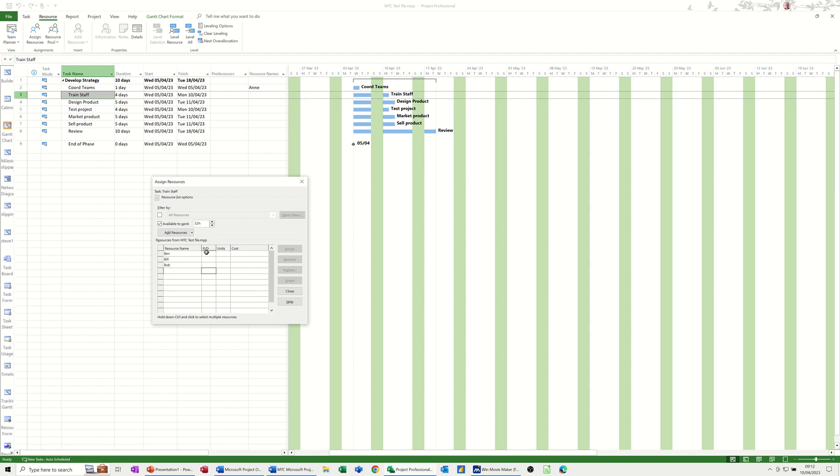Now if I put this up to 40 hours, as soon as you do that, none of them are available for 40 hours. So 32 hours is okay - you can pick any one of these at 32 hours. I'll assign Ben.